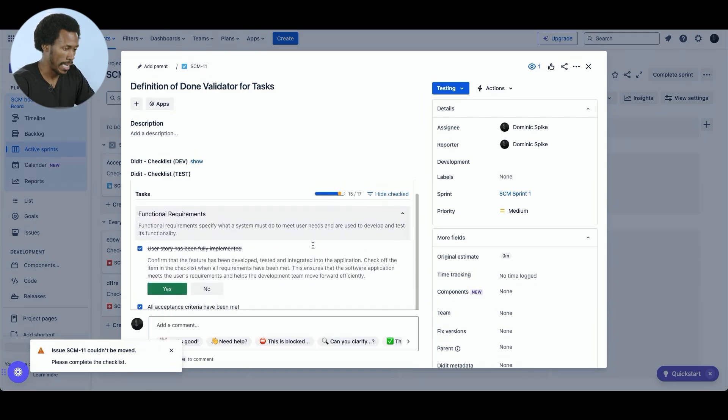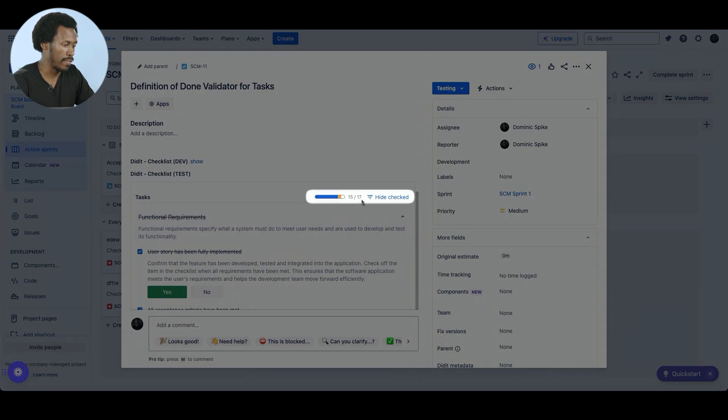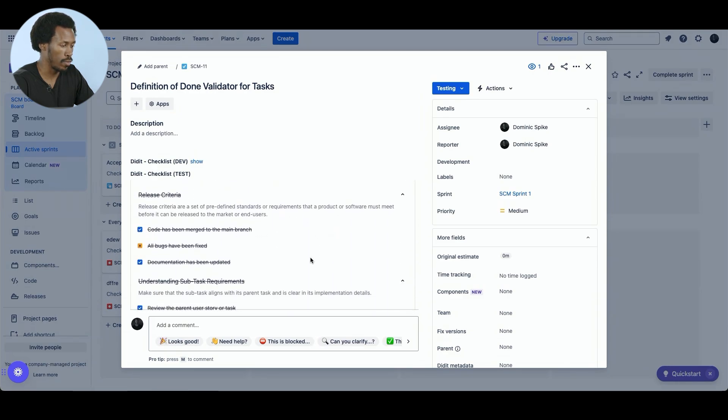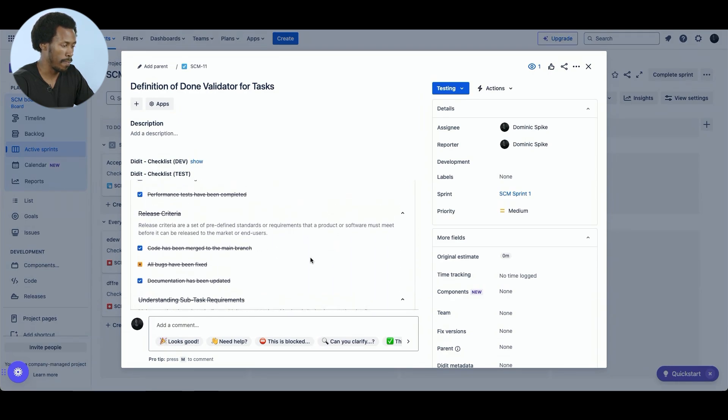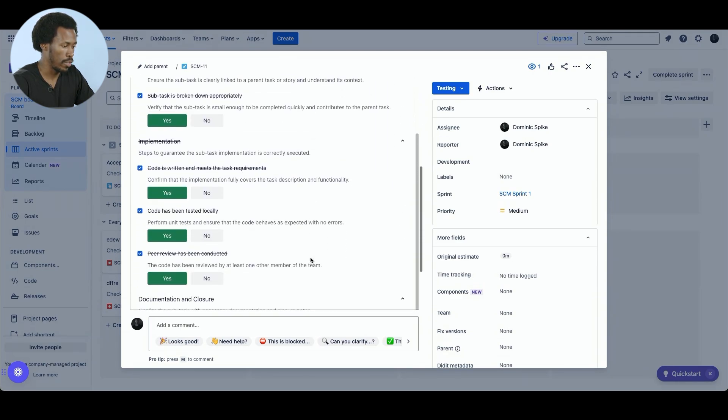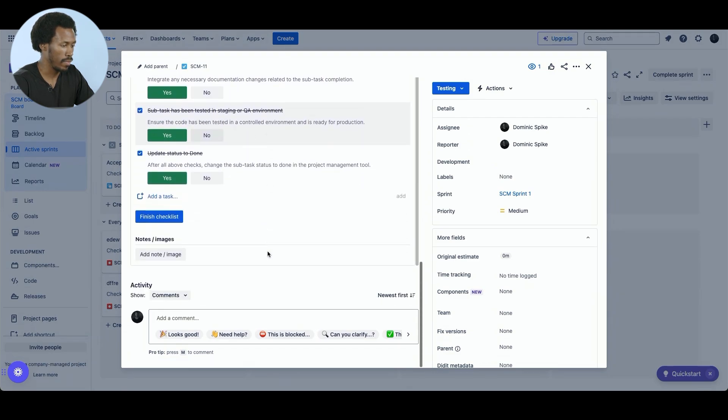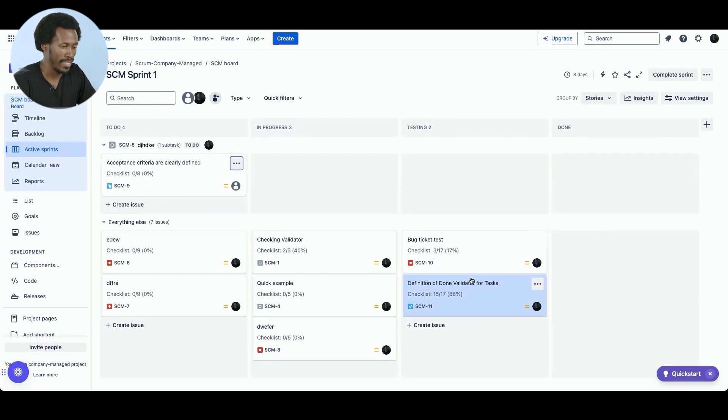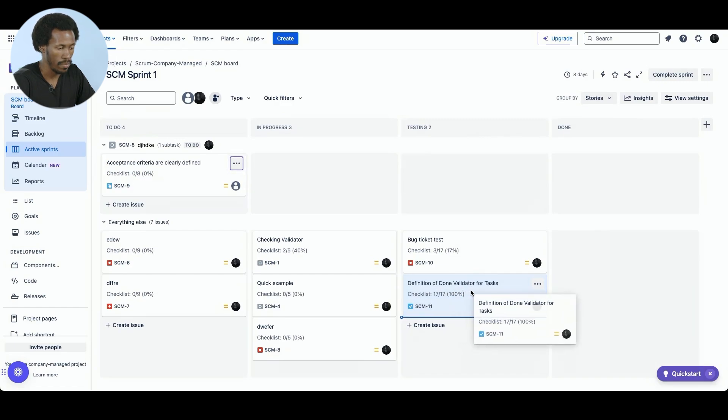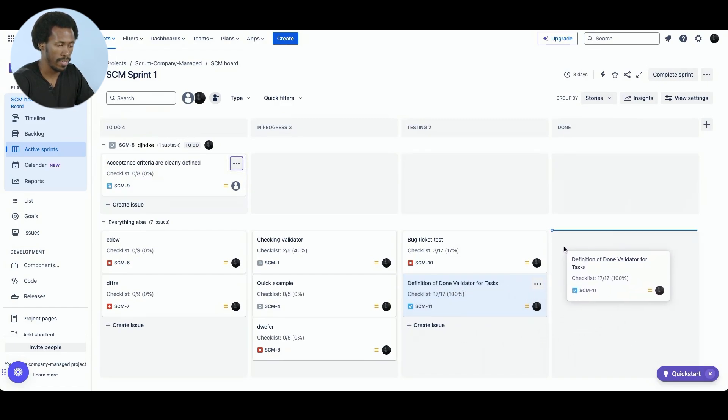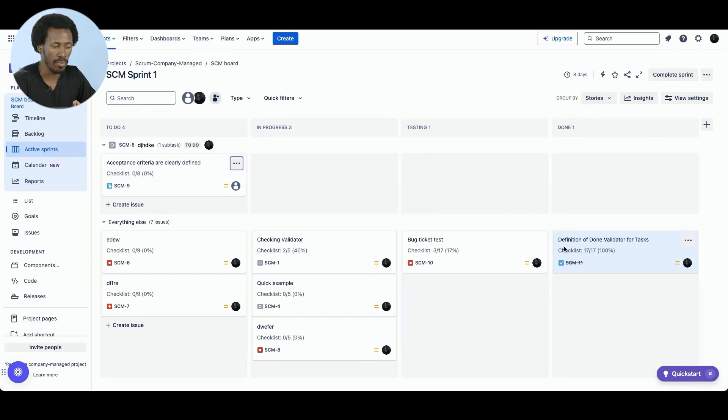So the validator has forced us to open the task. Look through the checklist. As you can see, 15 out of 17 items have been completed. But we need to complete all items. So if we scroll down to the bottom, we can see these two need to be checked off. Then we complete the checklist. And now if we close this, we can then try to move it again to the done column. You can see 17 out of 17 or 100%. And here we are. The task has been completed. And the validator approves that the checklist has been completed for this task.